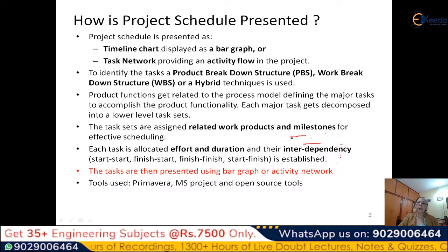Another task somewhere. So if this is the start, one minute. I think I'm getting it wrong. Yeah. So this is the start of task A. This is the start of task B. So if we say that these two are dependent, that means these two must start together. And it is start to start.